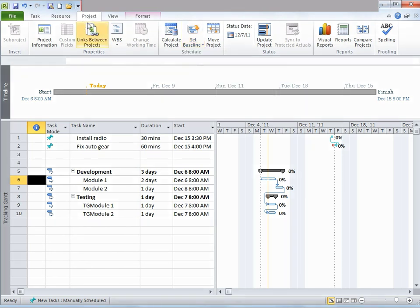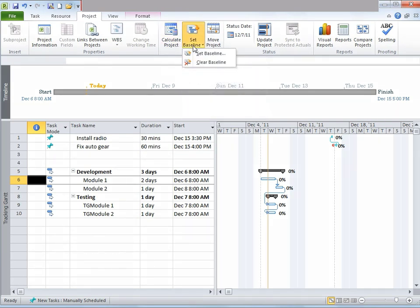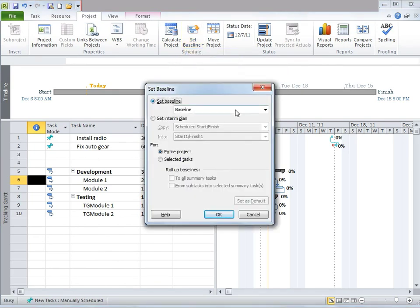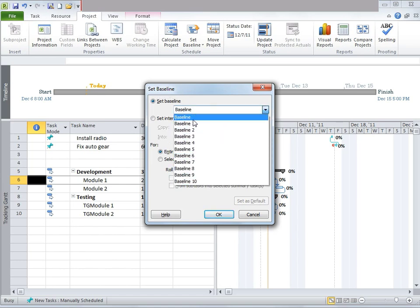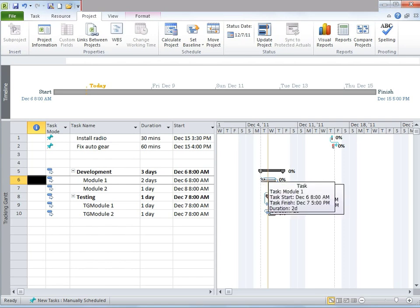Let me demonstrate that. We're going to go to the Project tab. Under Schedule, there's something called Set Baseline. Click on that dropdown, and then click on Set Baseline. Another window would pop up. Click on this dropdown and notice there are 10 baselines plus a normal baseline. I'm simply going to click OK.